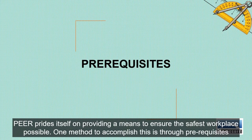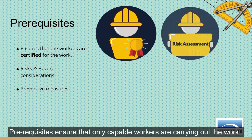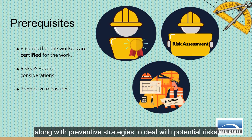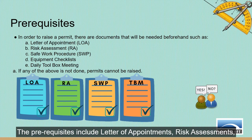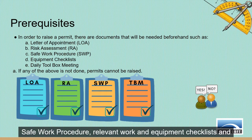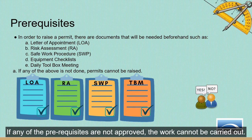Peer prides itself on providing a means to ensure the safest workplace possible. One method to accomplish this is through prerequisites. Prerequisites ensure that only capable workers are carrying out the work, potential risks and hazards are considered, along with preventive strategies to deal with potential risks. The prerequisites include letter of appointments, risk assessments, safe work procedure, relevant work and equipment checklists, and daily toolbox meetings checklist. If any of the prerequisites are not approved, the work cannot be carried out.